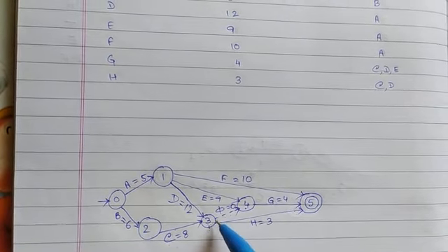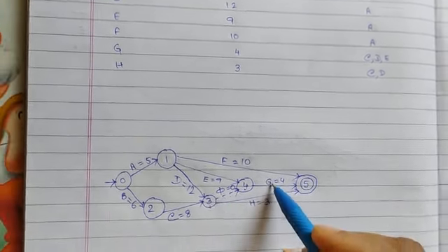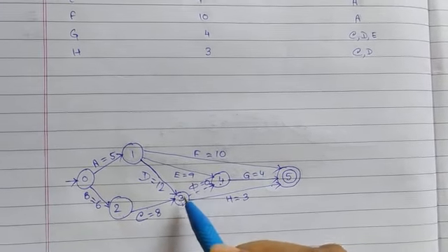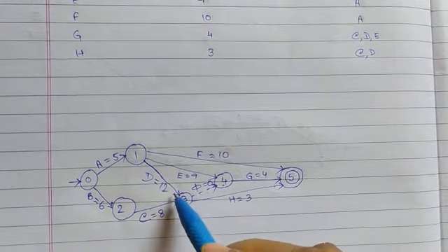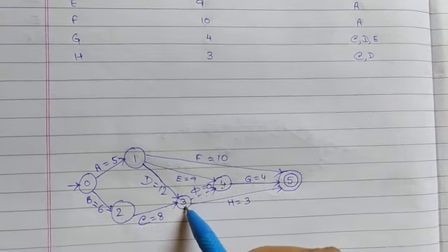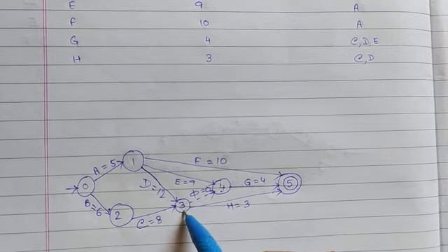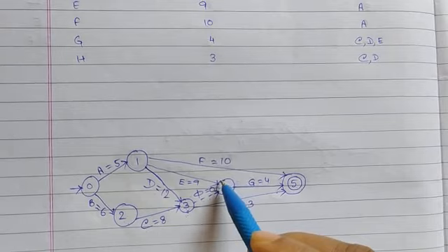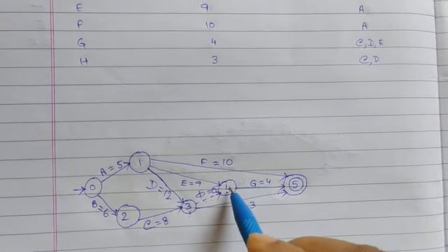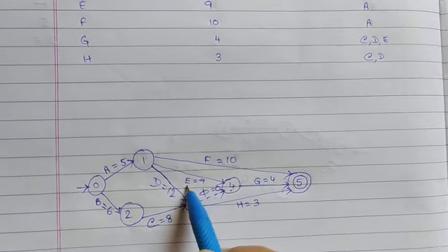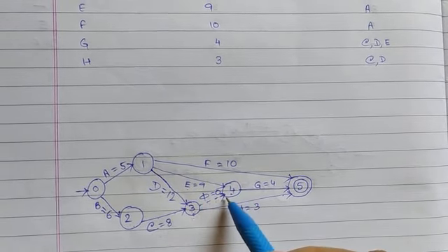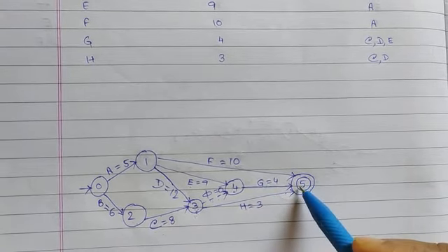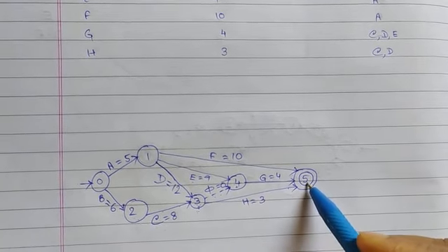That means for the task G we will have to provide the null task or phi task from 3 towards 4, as C and D end at state 3, whose output or end product will be forwarded to state 4, where the system will get the output of the task E. Taking the output of all three tasks, G will execute and it will end at the end state, that is state 5.